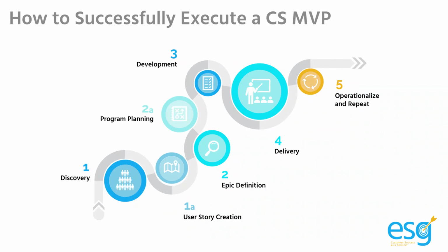With approval in hand, you are now ready to operationalize your MVP, which means you'll need to focus on integrating new capabilities that you had developed into existing workflows, providing training to key team members who will be responsible for delivering the journey and experience to your customers, and collecting feedback from applicable stakeholders, especially customers, as you roll out